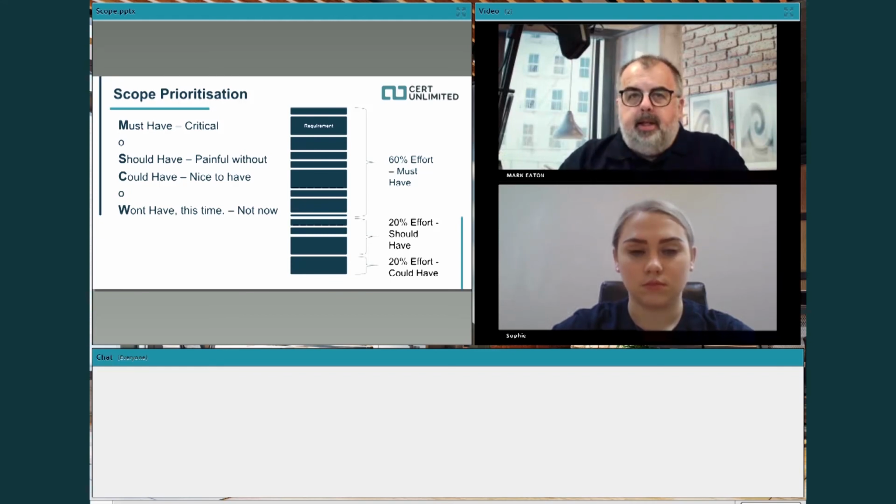It's often referred to as swapping, where you swap one feature with a similar feature of lower value that had the same amount of effort, so that you can keep your project on track. Saying that, if you've got a feature that increases the number of critical items and you don't have that room, this is what change management and leadership management is all about. It's about ensuring...